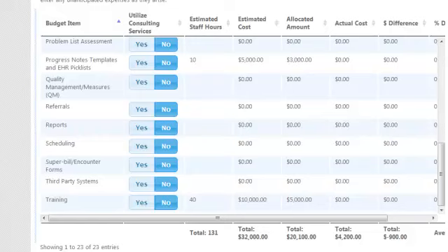As we look at the budget review, you can see we did not allocate sufficient funds for some cost centers. The template and problem list upgrade was under budgeted. Same for replacement of the server and workstations. Here's the sample estimate we entered for training. The impact assessments revealed we allocated less than we are now estimating for each of these items. The running total at the bottom tells us our estimated budget exceeds the amount of dollars we allocated. This means we either have to redistribute funds or find additional dollars to allocate.